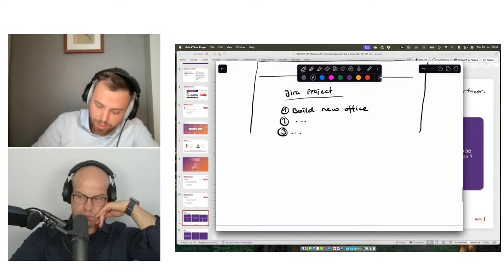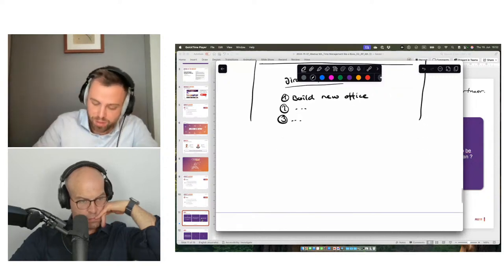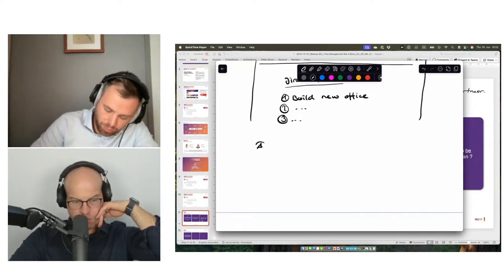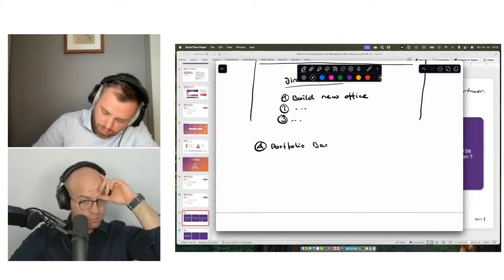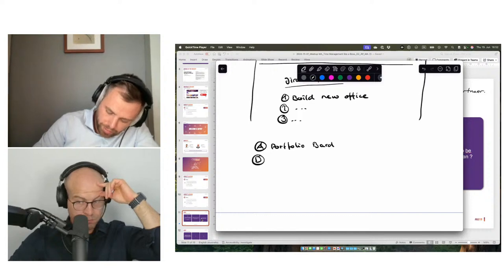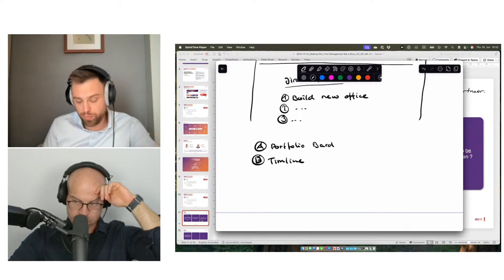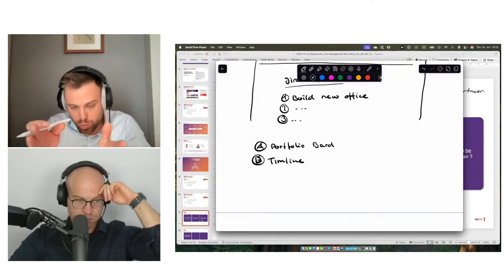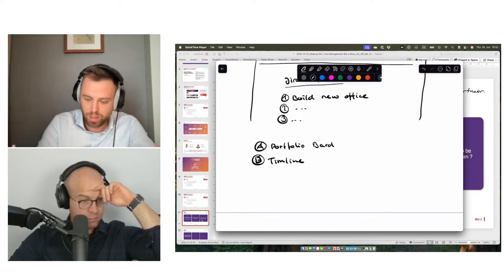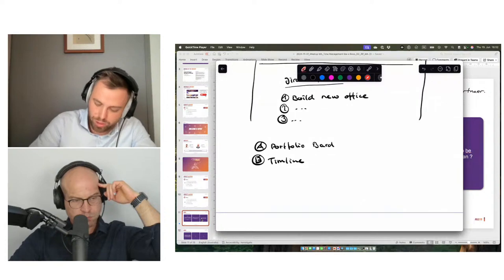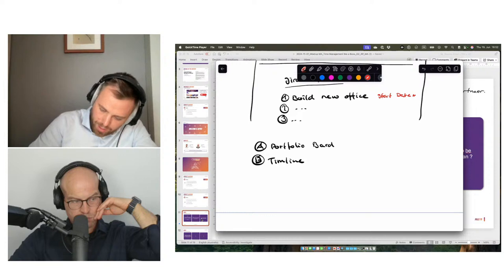So from this on, what happens basically is in the app, and you will always then work in the app, if you look into your portfolio, you will have your portfolio board again, and also your timeline, as I showed you before. And the app does the following thing. It makes it possible to add to a Jira project a start and an end date, which is currently not natively possible in Jira, which means each of these Jira projects here gets a start date and end date.